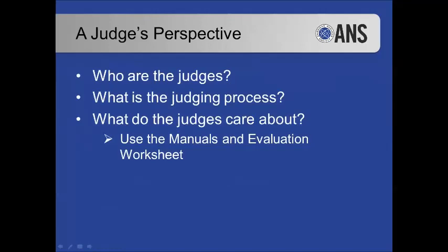We'll also care about details, so the consistency between different sections. So if you said in a section, maybe about the technical program, that your AV cost is X per room, and then we look at the budget, and there's a different cost in there, well, that's a problem. There's a detail inconsistency, and most judges will cross-reference all these things to make sure the information is actually what it is. So if you have two different numbers there, we're not quite sure what's the right number. Is your budget correct? Are you properly planning for that?